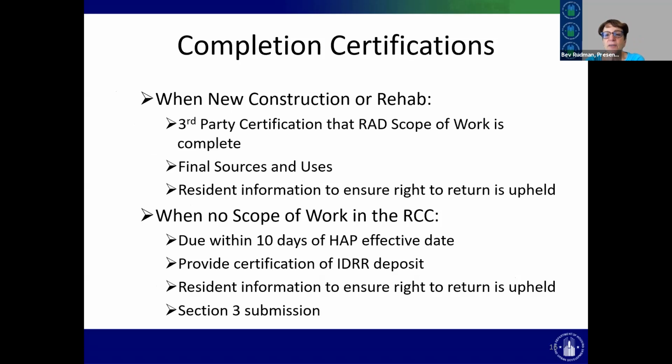And then completion certifications. So we launched these a year or so, maybe 2 ago. I don't remember now exactly. But this is sort of the final look. So if you have new construction or rehab, this is after your construction is completed. There are certain things you need to give us, including a third-party certification that the scope of work is complete. You go into the transaction log and do final sources and uses. And we do ask for information about the residents to ensure that the right of return is upheld.